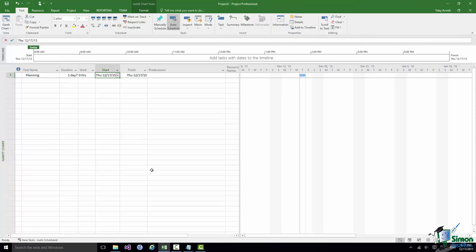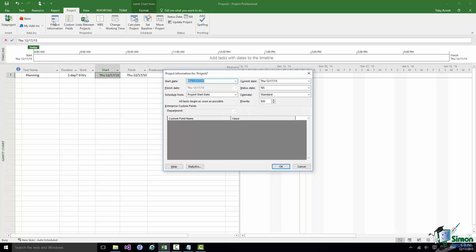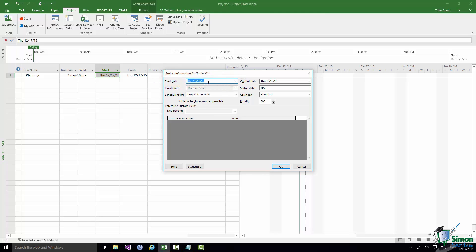Going back to the start date — Thursday, December 17th — by default new tasks are created either on the project start date or on the current date; in this case both are today. You can check which it's set to by looking at Project Options on the Schedule page, right under where you've set New Tasks to Auto Scheduled. In this case it says Project Start Date. The project start date by default is the date I created the project — today, Thursday December 17th. If you click on the Project tab on the Ribbon, in the Properties group the first button is Project Information. Click on that and one of the basic pieces of information is the start date: Thursday, December 17th, 2015.